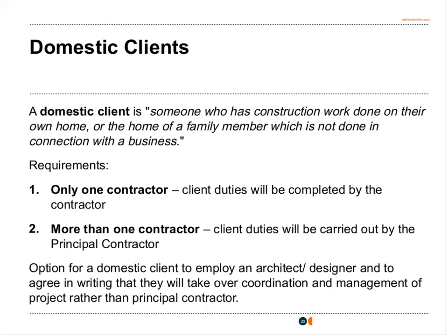This is going to be equally of interest if you are a designer working on these types of projects. There does not have to be a principal designer on a domestic client project. However, there can be, and if you take on those roles, you will have the obligations that a principal designer does have. Also, as a designer, as we'll come to in our case study, you have obligations to ensure that your client is aware of their duties, and so that would come into play if you were filling that role.